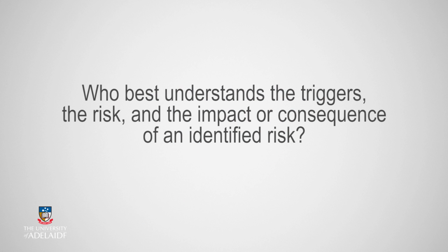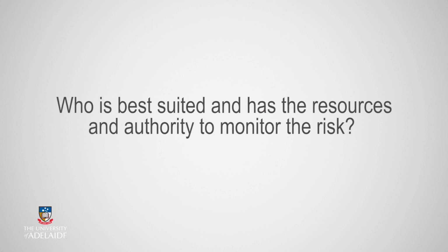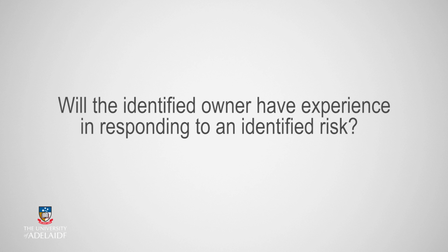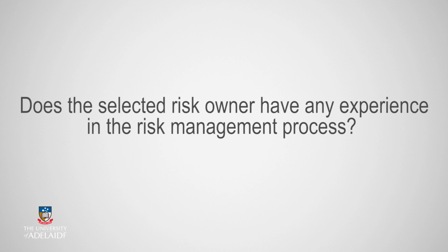When selecting the risk owner, you can consider the following questions to ensure that your decision is fit for purpose. Firstly, who best understands the triggers, the risk and the impact or consequence of an identified risk? Secondly, who is best suited and has the resources and authority to monitor the risk? Thirdly, will the identified owner have experience in responding to an identified risk? And finally, does the selected risk owner have any experience in the risk management process?